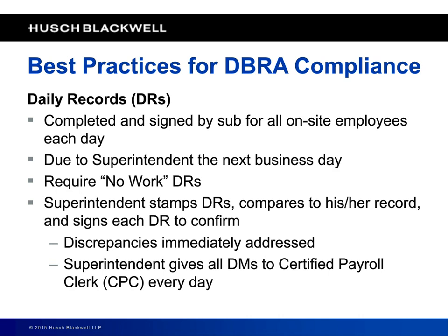What form you should use, you can put that on your daily report. You can generate a different record called a daily force report or a manpower report. You can put it on your CQC report, but somebody on a daily basis, and this is something you should make the sub do,